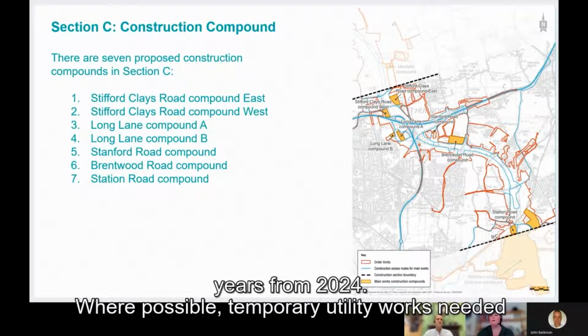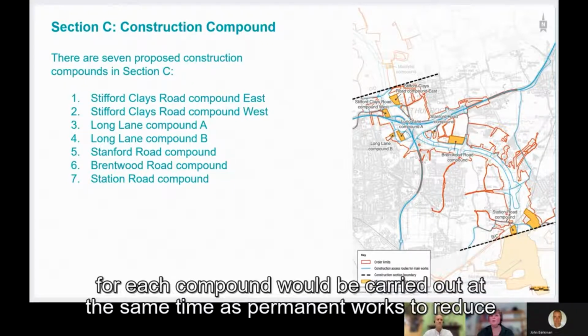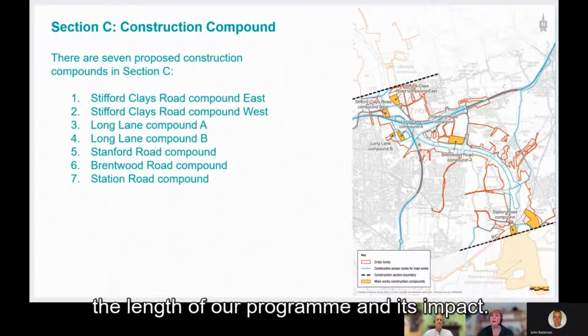Where possible, temporary utility works needed for each compound would be carried out at the same time as permanent works to reduce the length of our programme and its impact on the local community.